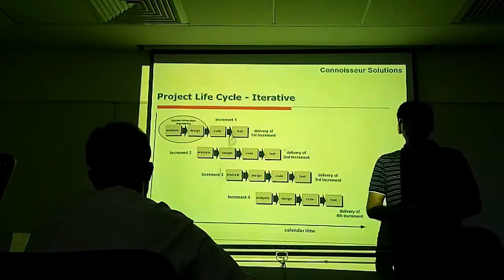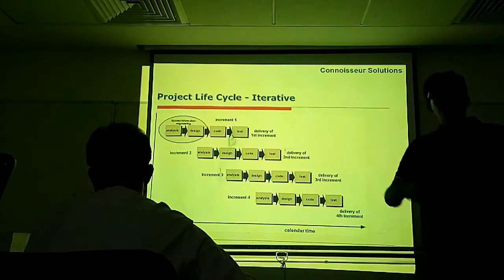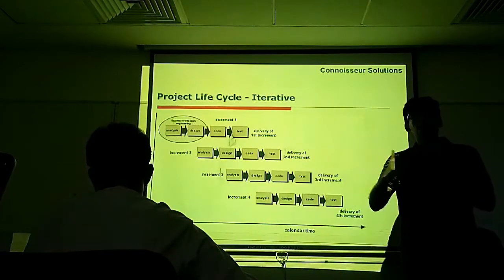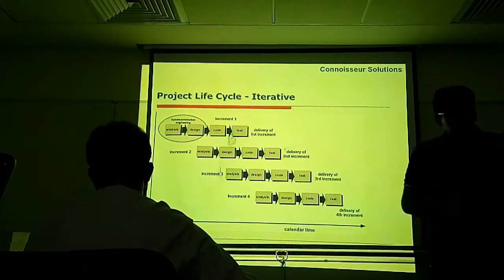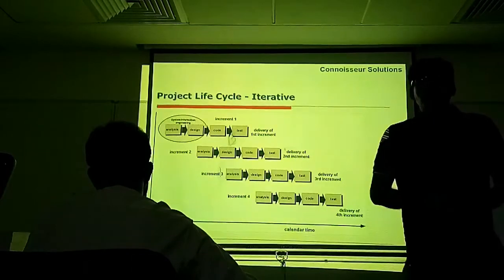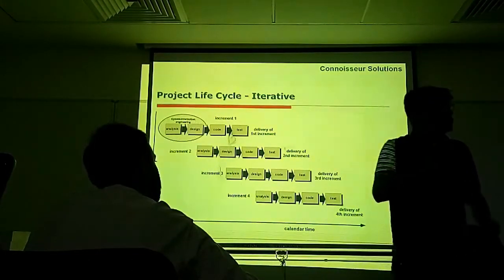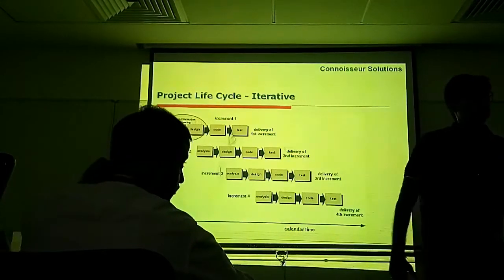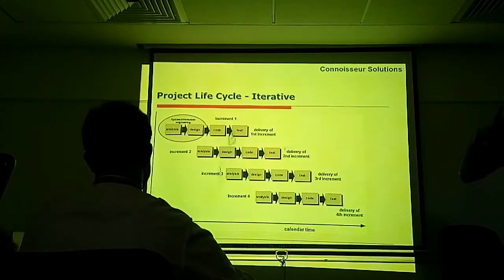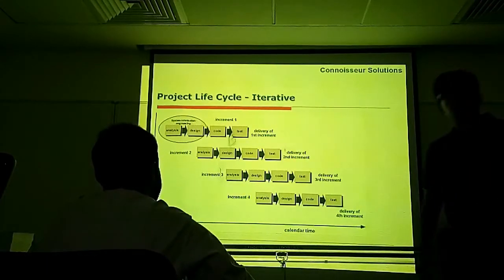Now, sometimes, even this might not work. Because the size of the phase in incremental life cycle is around 3-4 months. Sometimes, we work in a turbulent business environment. In a turbulent business environment, the requirements keep on changing very often. When the requirements keep on changing very often, even this mechanism won't work.